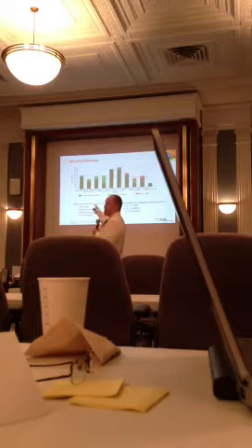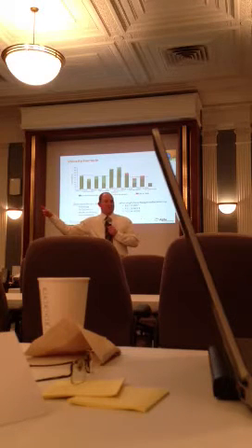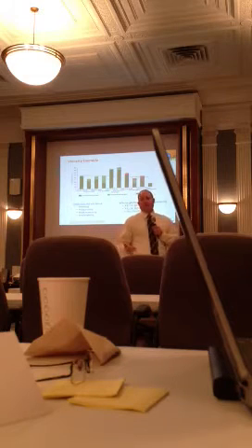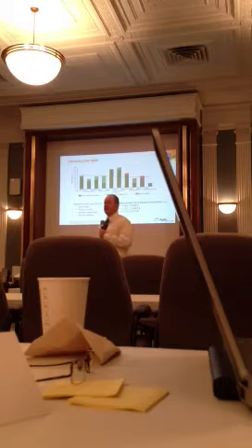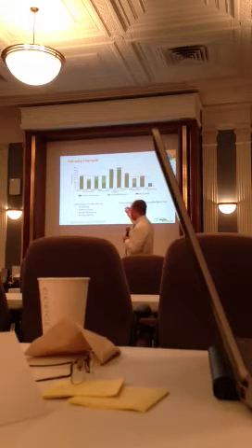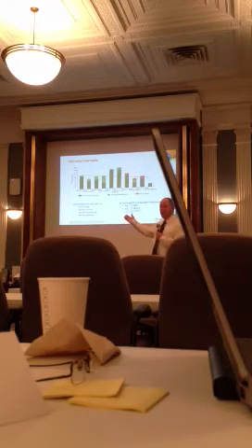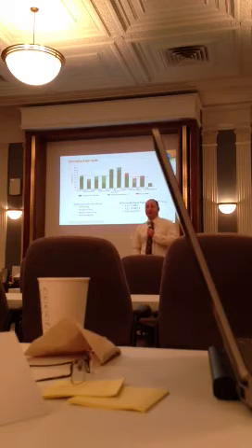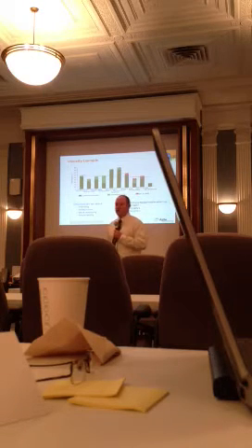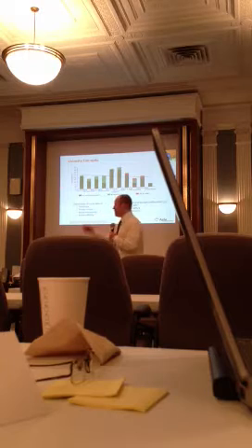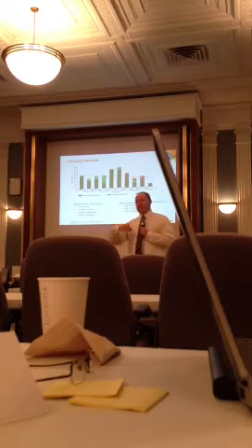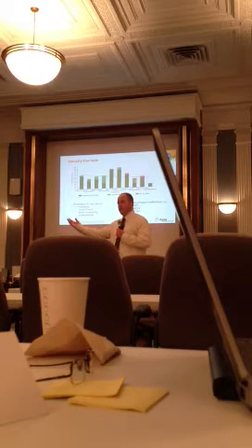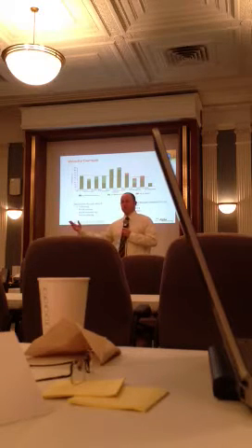And in that iteration, the best person on my team, the top architect, went on vacation. And you can see the kind of impact that can have on your team. So I knew him leaving was going to have an impact. I just didn't know exactly how much. I knew we had delivered 105 story points. I only let my team commit to 80 because he was going on vacation. And then we only delivered 60. We only got acceptance on 60. So I actually was still too high, right? I let them commit to more than I should have.